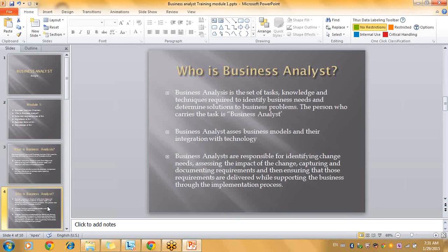See, we as business analysts should ask the right questions every time, right? So once you get a request from the business to change the format of the username, obviously we as analysts cannot do it, right? We have to go to IT, wherein the development team will be doing the change for you. Before doing the change, you should not give an approval right away just since the business has come to us. No. What we will do is go to them and ask, this is the change. What is the impact? Is it going to impact any of your existing code, right? How much effort is needed, right?